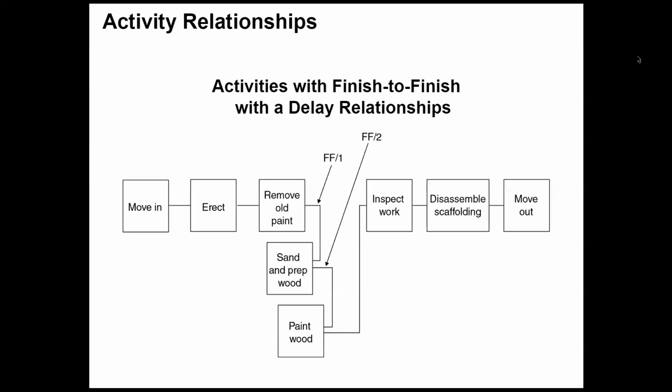If you don't want to represent it this way, when you remove the paint, you may already start with it. In the meantime, you may divide this wall into 2 different sides, left and right. You can start by removing the left side, and then once your left side is done, you can do the sanding, right? When the left side is done, you can do the paint.